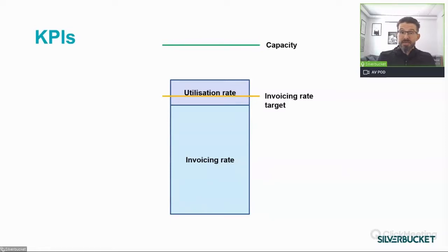And new products and services must, of course, also be developed. And some administrative tasks always take some time. So now we have a new area in our resourcing graph. This purple area indicates the allocations for all the internal and non-invoiceable projects.